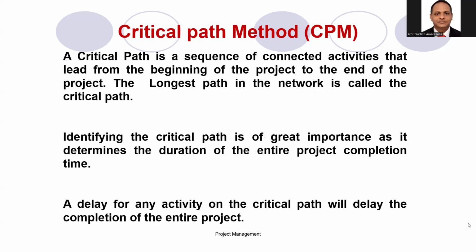Don't worry. Identifying the critical path is of great importance, as it determines the duration of the entire project completion time. After you identify the critical path, you can identify the entire project completion time. A delay for any activity on the critical path will delay the completion of the entire project. After we identify the critical path, we can identify what the critical activities and the non-critical activities are. Normally, critical activities cannot be delayed.